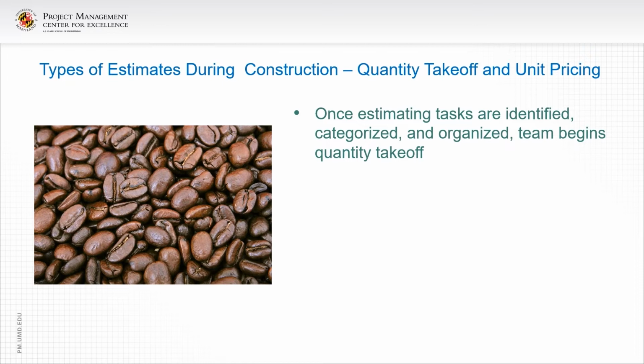The process requires a thorough understanding of the work involved in each of the different disciplines of the project. Often the best approach is to build the project item by item on the takeoff form and then quantify each item. Pre-printed takeoff forms which identify all the estimate items can serve as a checklist.